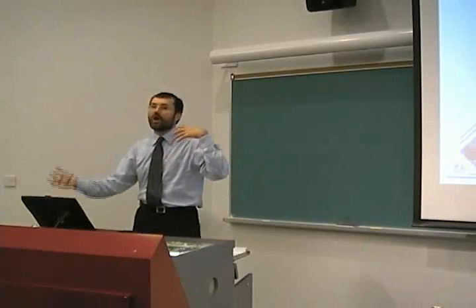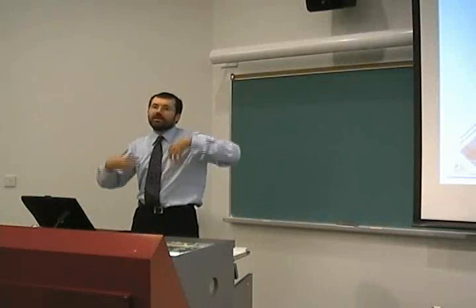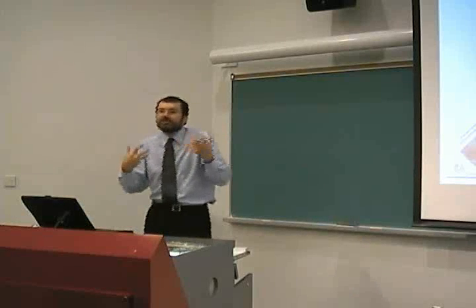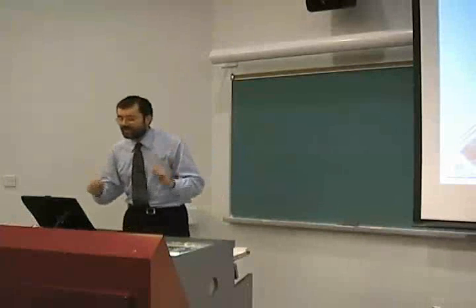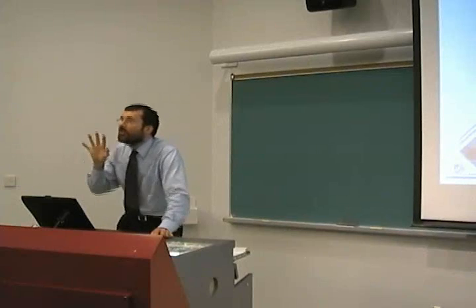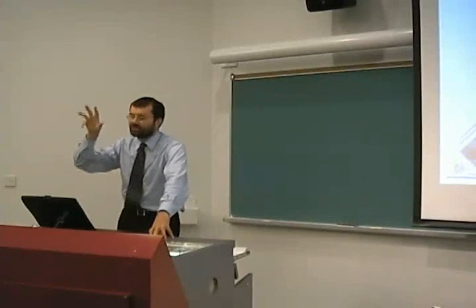And all of these things require intense negotiation and some ability to get along with people, and perhaps some political posturing, sometimes with different classes of users and customers and managers. That's why a lot of this is human-scale kinds of things. The larger the scale of the change, the more difficult it should be to get a change request approved. But whatever kind of change request, there should be a process for approving it. And that process shouldn't be overly sophisticated. It should be the right level of sophistication. The right level of management should approve the changes.